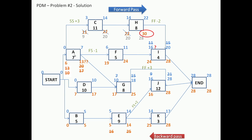Now, as we come to A again, A has a start-start relationship with C, a finish-start relationship with F, and a finish-start relationship with G. As you get values from here you will see that again the start of A is different from the finish of A. The finish of A might be controlled. If I start A on 6 and finish, when should I finish A? I can finish A on 13 if I am doing it continuously. If I start A on 13 it will delay the late start of C which is not acceptable. So I have to start on A before 6 and I have to finish by 13. But do I really need to finish by 13? If I finish later than 13 what happens? Really you can see that none of these activities get affected. So why am I constraining myself? This is the question that we need to see.